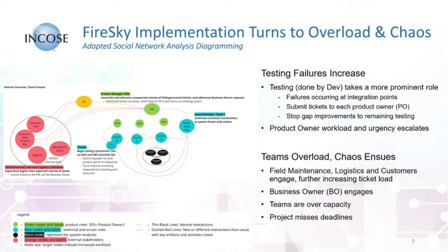So far it's the direct pain points, the direct causes, the leading indicators. And in their retrospective, the team acknowledges, because hindsight is 20/20, that way back in the planning, when everybody really stepped up and acknowledged this was bigger than usual, in reality, they caught about 30 to 40% of the interfaces that they really eventually had to address.